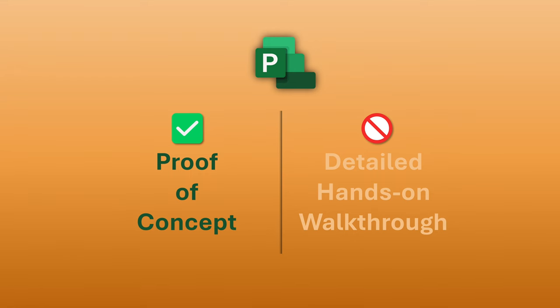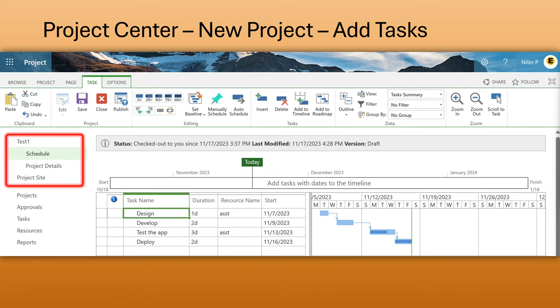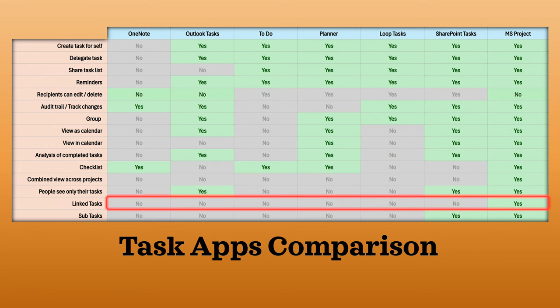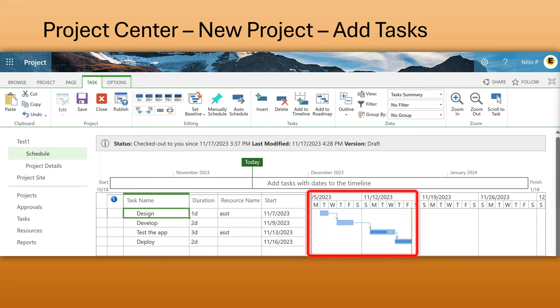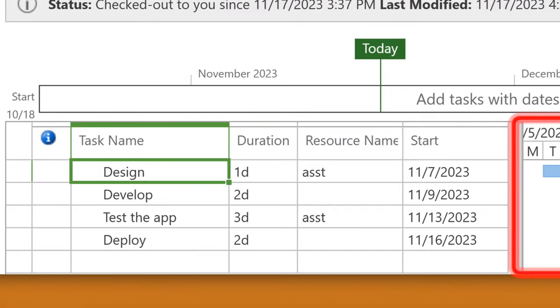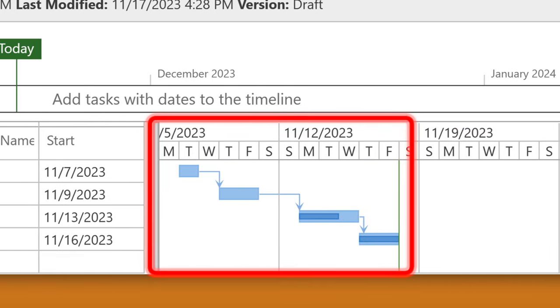This is not a deep-dive hands-on session on MS Project. The project manager goes and creates a new project and adds tasks. Many people want linked tasks, and we saw in our comparison that none of the other tools give you linked tasks — Microsoft Project is designed for that purpose. Once you add and link tasks, you automatically know when the project is going to get over without any manual calculation. You put the start date and durations for each task and link them.